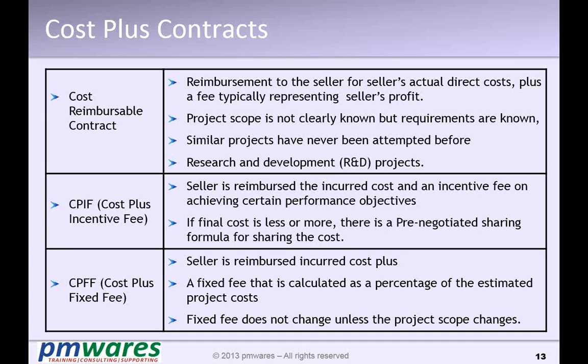Especially research oriented projects normally take this kind of contract, where we say, okay, you invest your money, we will pay you whatever you invest in that, or whatever we decide that this is what you need to invest, we will pay you. Okay, so cost gets reimbursed to the vendor.